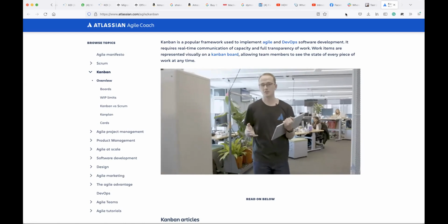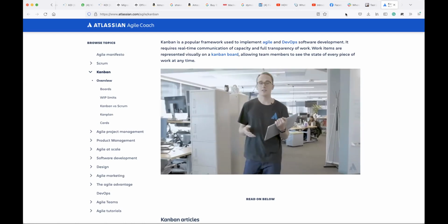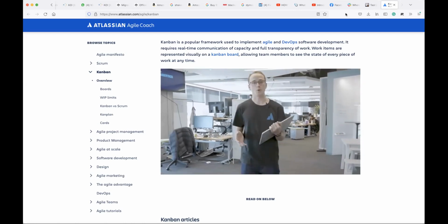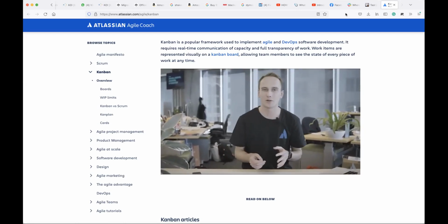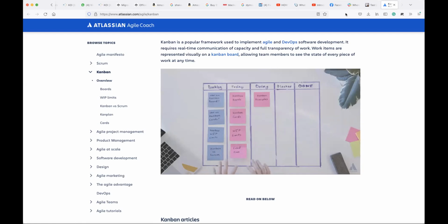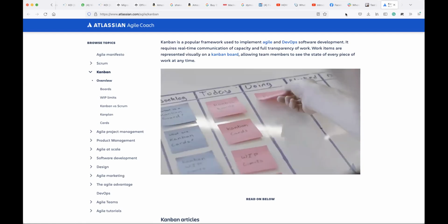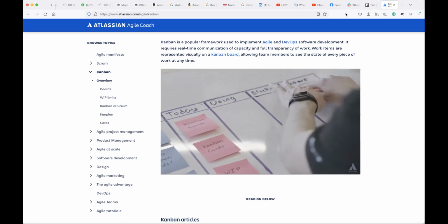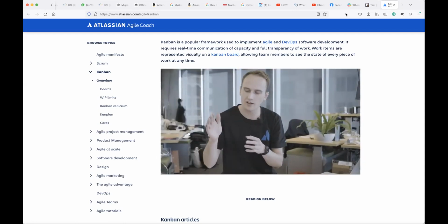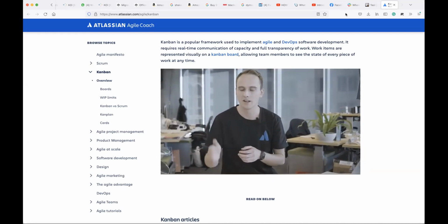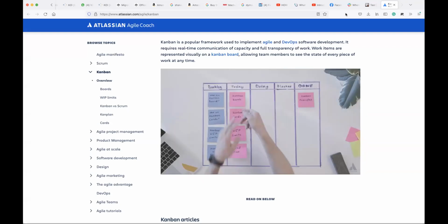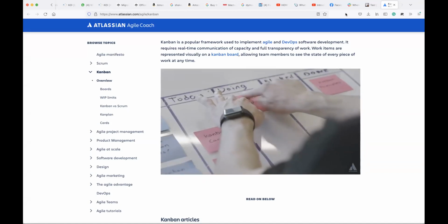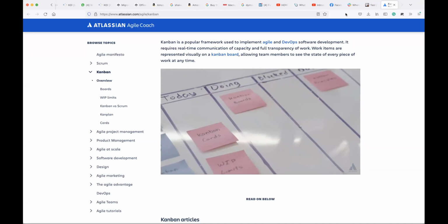Now, if those principles are something you can get excited about, then you might want to start by making a Kanban board. So this is what I wanted to show you. It's a Kanban board that I built to visualize all the concepts we're covering in this video series. I just finished talking about the Kanban principles. And it's important that I started on the right side of the board here. Kanban is a pull system, which means when you have bandwidth, you look to the left and pull cards from left to right. Since I have bandwidth now, I'm ready to start my discussion of Kanban boards.